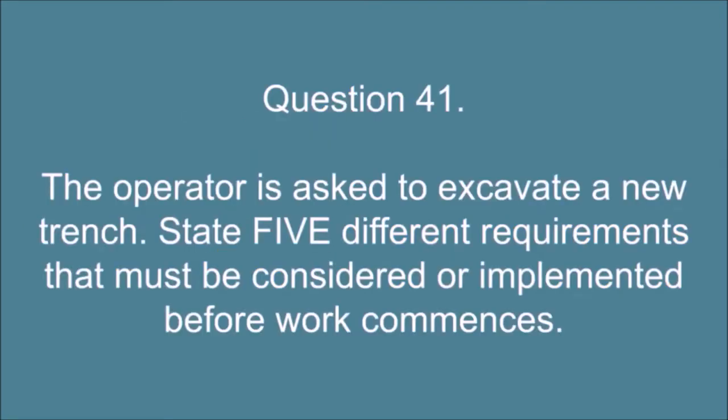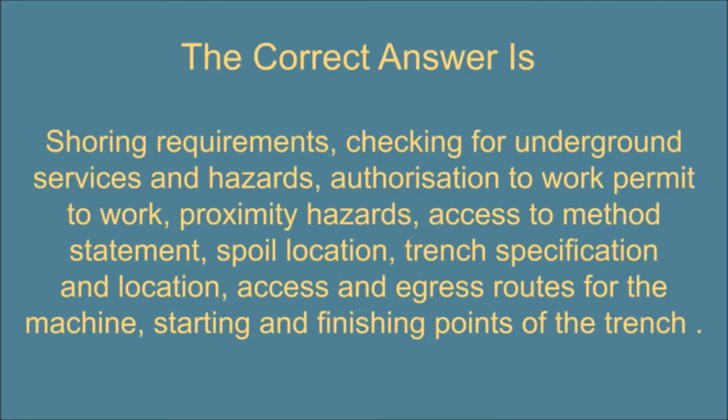Question 41. The operator is asked to excavate a new trench. State five different requirements that must be considered or implemented before work commences. The correct answer is: shoring requirements, checking for underground services and hazards, authorization to work, permit to work, proximity hazards, access to method statement, spoil location, trench specification and location, access and egress routes for the machine, starting and finishing points of the trench.